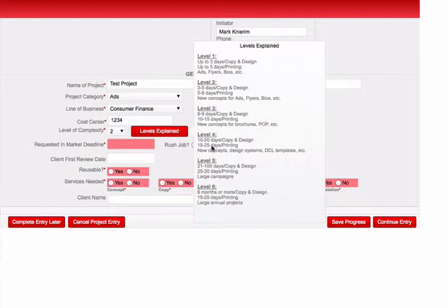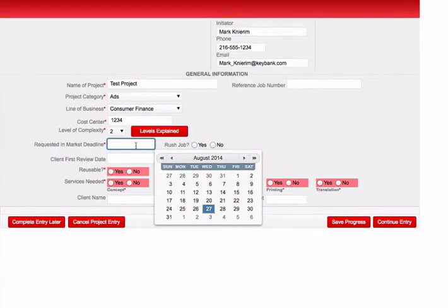revision milestones in. And the way this works is based on the date requested, the system will automatically work the milestones backwards from that date. And what's great about that is, depending on the level, it'll automatically tell the user, prior to them even submitting the project, whether they've given enough lead time.